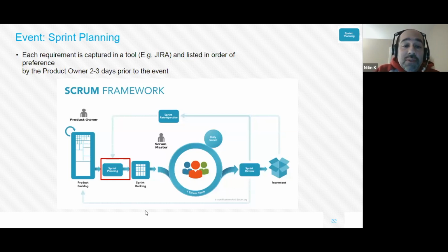This is very important. This is where the Scrum Master is truly facilitating, hey, what's our velocity or our workload? What's the capacity? Who might be out the next couple of days or the next couple of weeks? And get some logistical things out of the way before we look at this wish list that the product owner wants to present. Ideally, you've got some things that are not new. You've seen them before in refinement, and you can just quickly estimate them. This is a good time to just say, yep, we know what this is about. Let's estimate, and let's say we can pull it in.